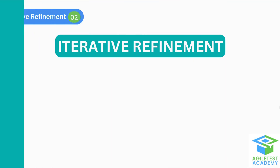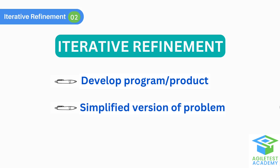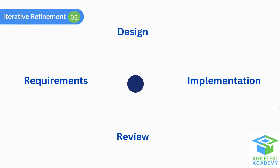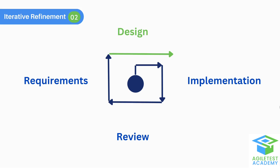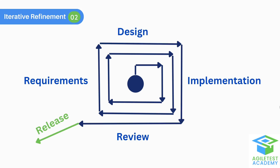Iterative Refinement is a process of developing a program or a product by starting with a simplified version of a problem and adding details and functionalities bit by bit. In a project, we can start by creating a prototype system early in the development process via design and implementation, then review the prototype with clients and test with users based on requirements, and refine the prototype in a series of iterations until the final product is released. Techniques used include user interface mockup, throwaway software components, dummy modules, rapid prototyping, and successive refinement.